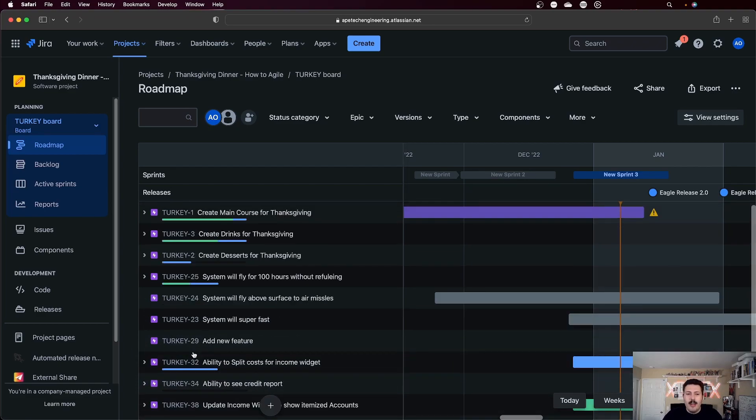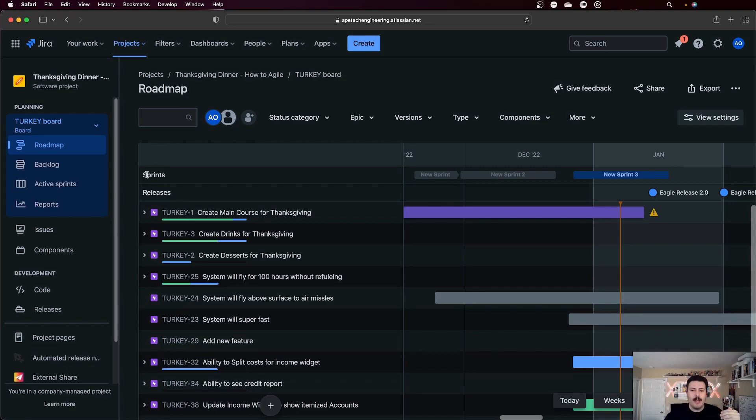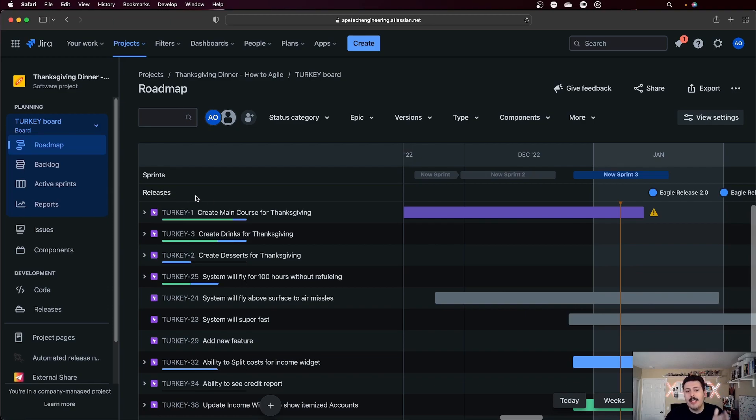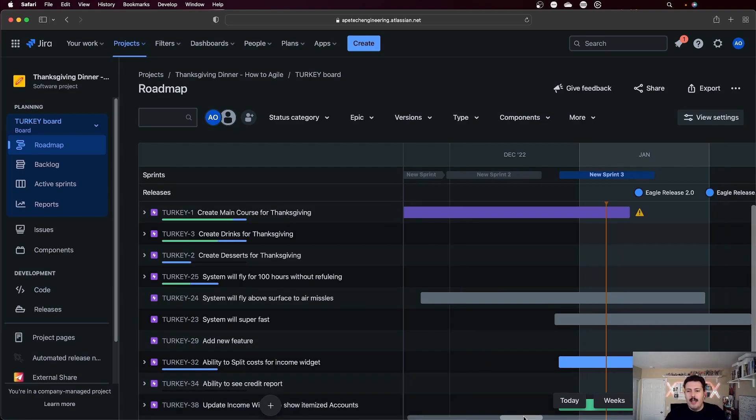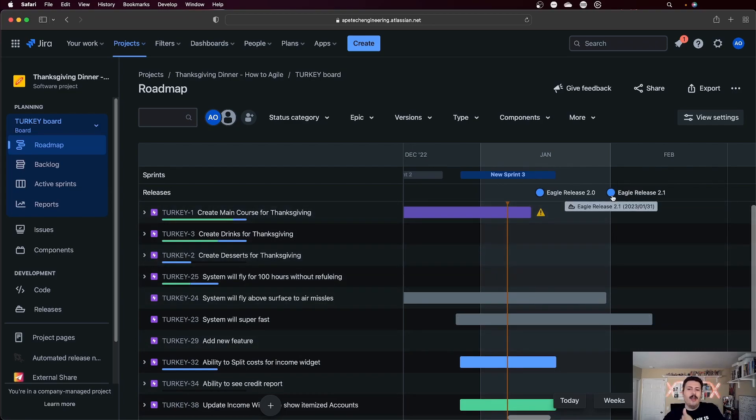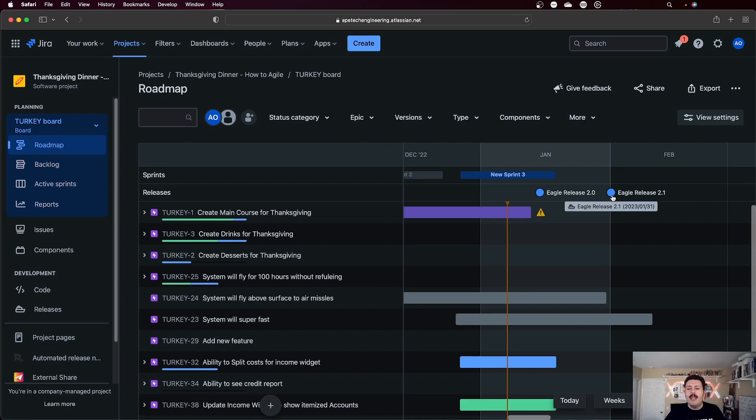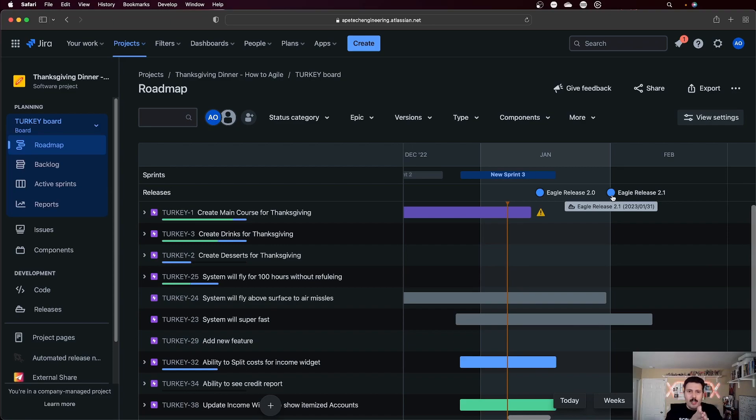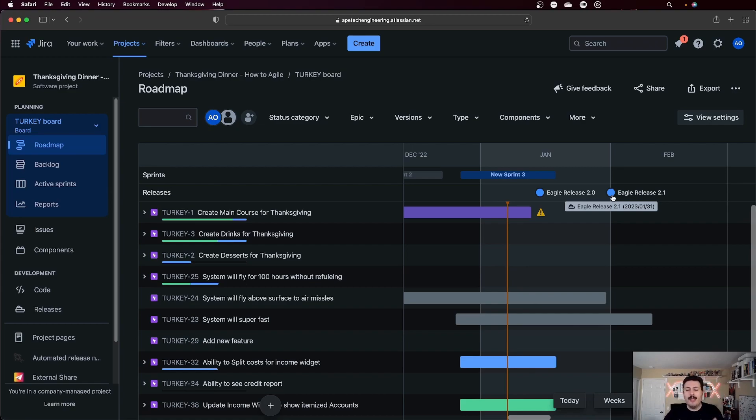Now, another thing that I want to show you is right below the sprints, but above all the issues that we've been creating, you have something called the releases. So when you put dates on your release, they will also show up on your roadmap here. You only get the end date. You get the due date of that release. You won't get the full bar, but you at least get an appreciation for if you're trying to pipe in your features or you're trying to make sure that certain epics are completed by a certain release.